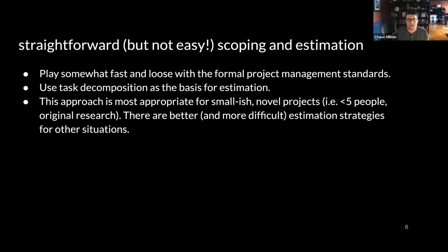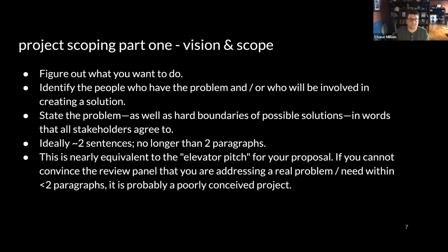And the basic idea of estimation here is something called task decomposition, which is to say you break up the project into smaller tasks. Each of those in itself is easier to estimate. You estimate all of those, and then you assemble them all back together in the end to make a final estimate. So I'm going to quickly run through all those steps. Again, I can't explain this in just 45 minutes, but there is a document to refer to.